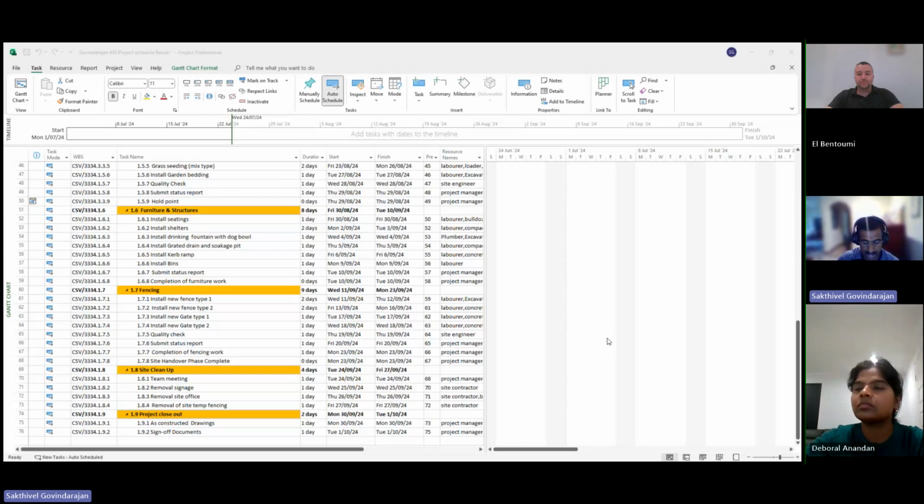The second is the material for the special gates, gate 1 and gate 2. As per Australian standard 1397, Australian New Zealand standard practice, the finish is black PVC coated. This is a hot dipped galvanized pipe, a specialized pipe to prevent rusting, with rust proof paint. Gate 2 is the same dimension. This is a special material and installing it takes a long time, so I put in sufficient time to install gates 1 and 2, along with the fence.